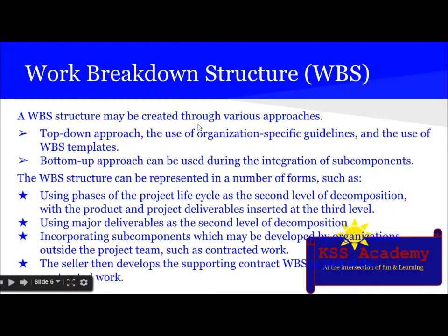Let's see in detail what is WBS or work breakdown structure. WBS may be created through various approaches. One is the top-down approach and the other is the bottom-up approach. Top-down approach involves the use of organization-specific guidelines and the use of WBS templates. The bottom-up approach can be used during the integration of subcomponents.